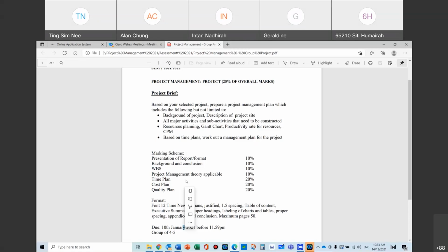Understood. And of course, productivity rate, I can actually see where your issue is. You're feeling that the driver will have one production rate and the machinery will have one production rate, so if you split it up, you need two production rates. Am I right? Correct, that's the point. So if you're worried about two production rates, it's okay, you can still split them, but use one production rate, the overall production rate of running that machine. All right, thank you very much.